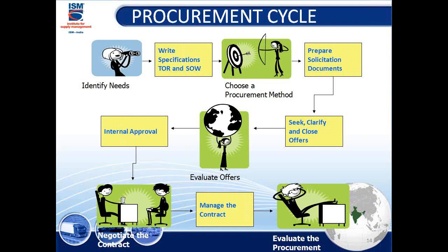The next one is the solicitation document. Being in the US, we were used to this term solicitation. When I came back to India, people talked of bid documents and tender documents. Anyway, these are the solicitation documents. Then we seek, clarify, and close the offers. You have the modality: when to open, how to open, and after that you evaluate the offers. We're showing a globe because offers were received worldwide.